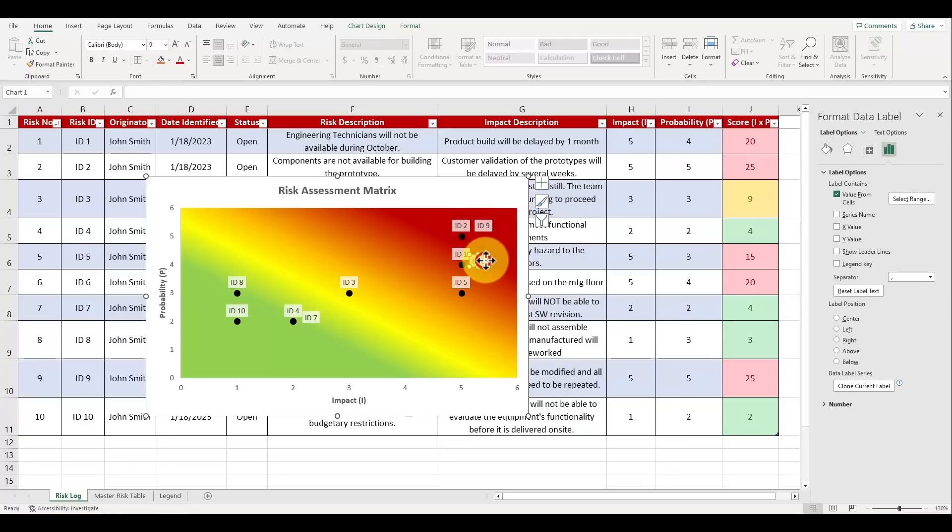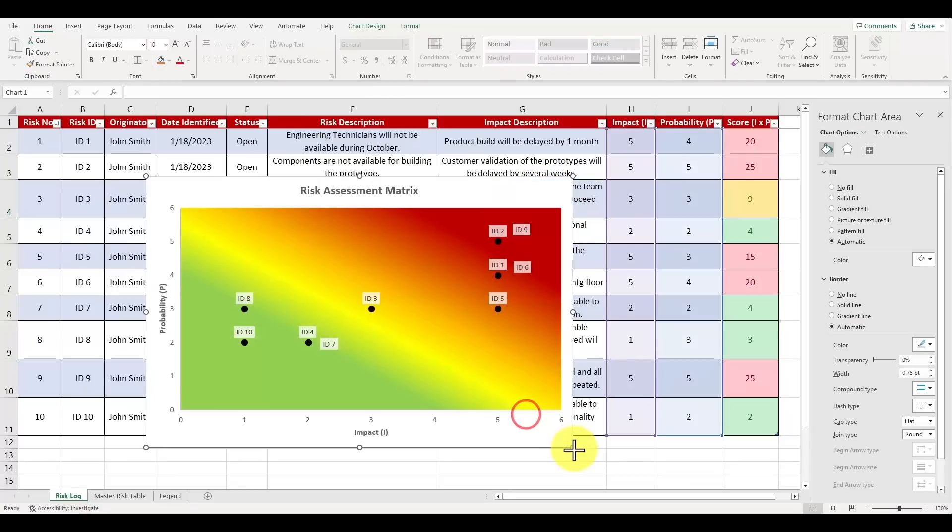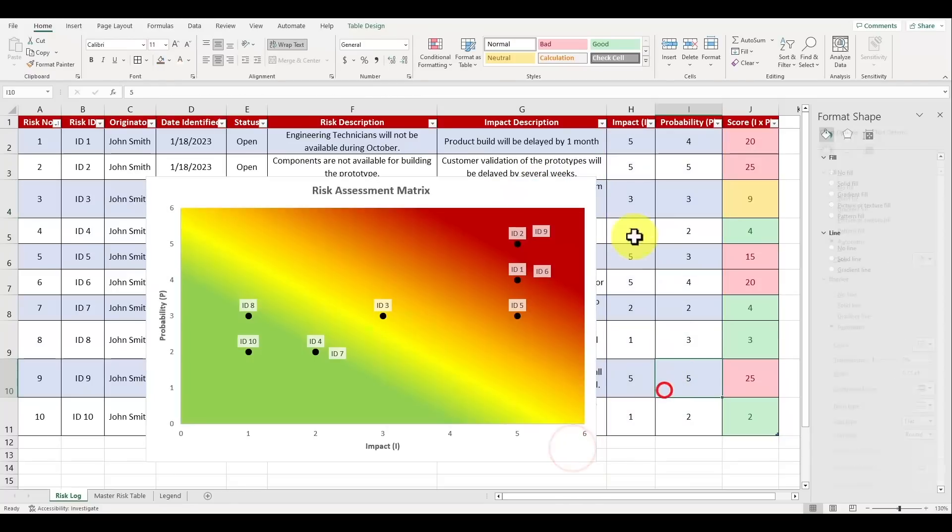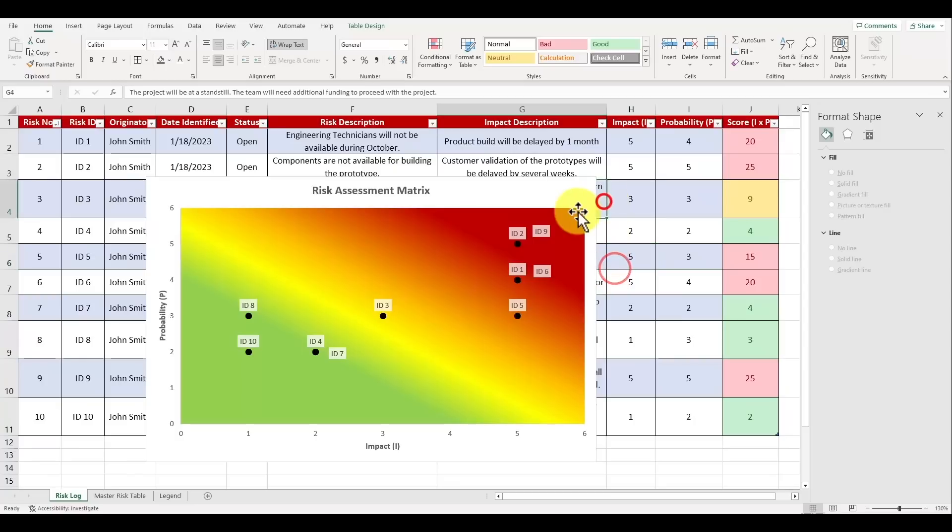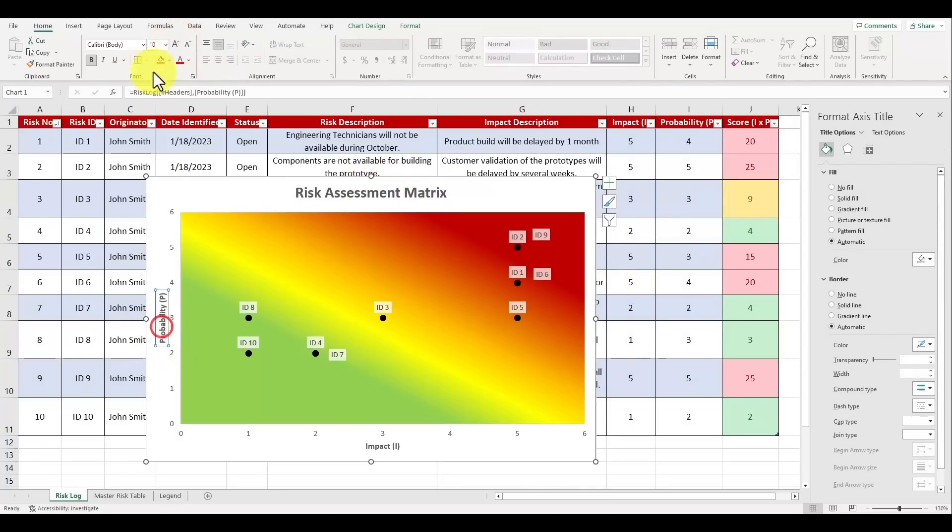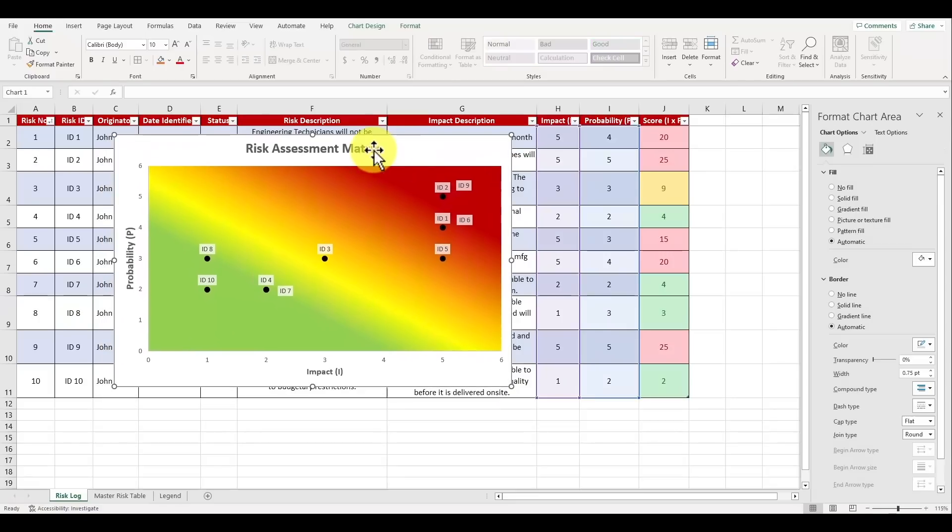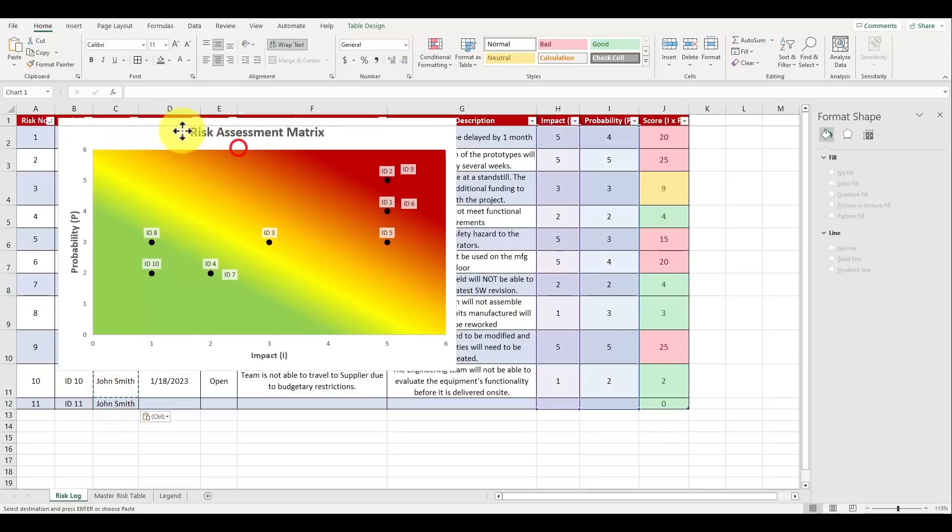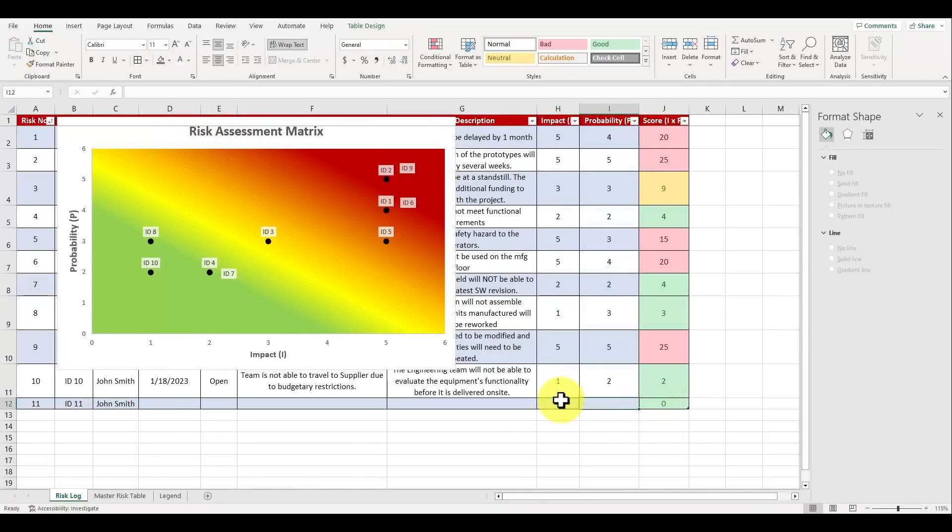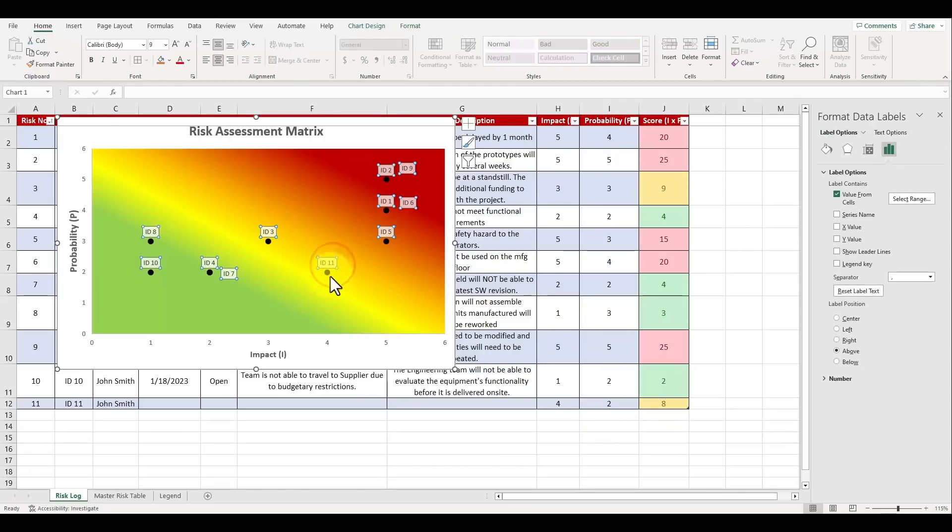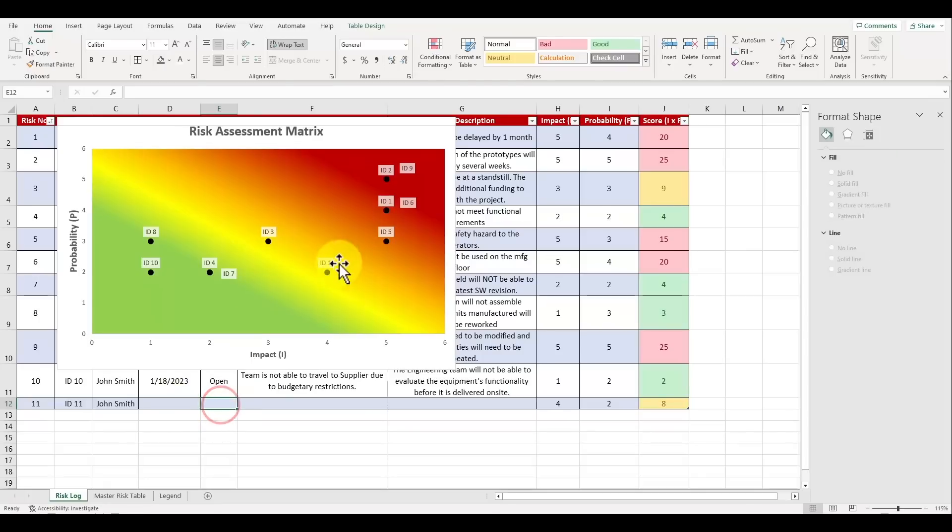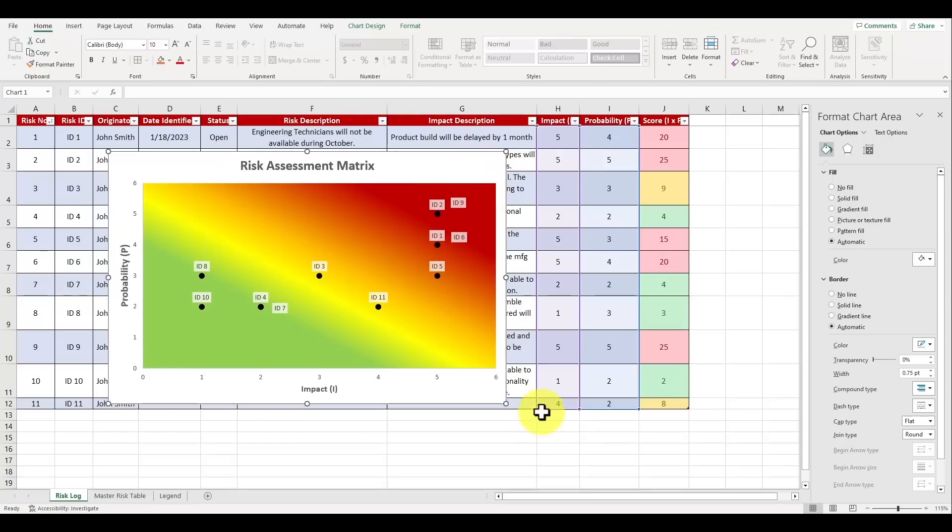And here is the final risk assessment matrix. All the data points now show which risk ID corresponds to a high or a low probability and impact level, and it's so much easier to identify which risks are the highest severity and require the most focus on. In our example it's risk IDs 1, 2, 5, 6 and 9. You can clean up the graph even more by bolding the titles and increasing the font size. What's really great about having this risk assessment matrix is that if you add another risk to the table, and let's say we populate it with some information here, let's say we add in an impact of 4 and a probability of 2, once we hit enter the graph will automatically update with the location of the risk ID. Pretty neat right?